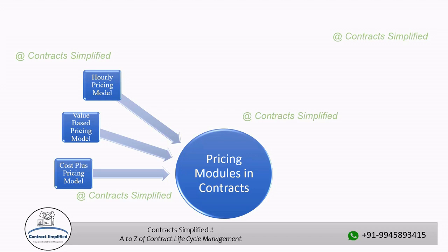If the scope of the project changes during its course, it can impact the number of hours required to complete it. In such cases, the provider and the client need to communicate and adjust the project's budget and timeline accordingly. While hourly pricing provides transparency, it can also lead to uncertainty for clients, as the final cost may vary depending on how long the tasks took to complete. To mitigate this, some businesses provide a maximum budget cap or offer a fixed price option for certain projects.